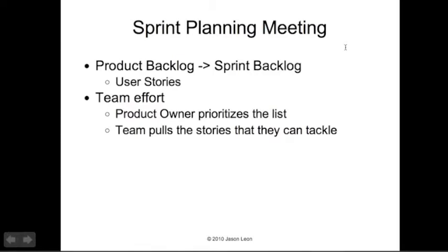Typically, your product owner is the one that's going to be what's called grooming the product backlog, or shuffling the priorities based off of what he's getting from the other stakeholders as the direction that they should head, or off of his own research or her own research as to what the market requires for your product.